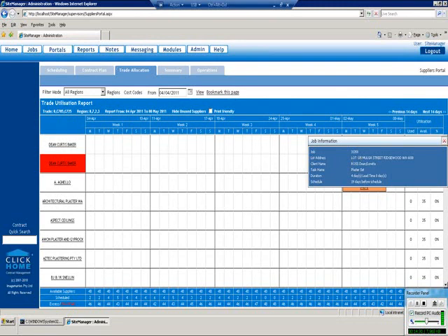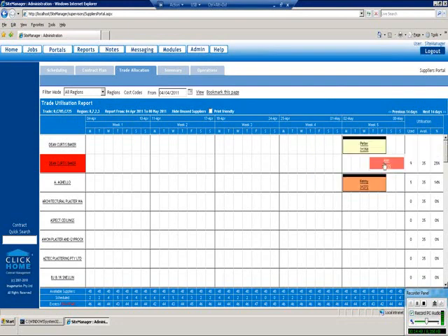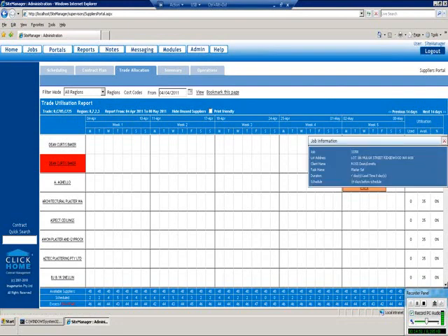That gives a bit more detail about that job. So job number, full lot address, the client name, the task name, the duration, how many days, and that task's relationship to the baseline. So is it ahead of schedule or behind schedule? So in this case, we're ahead of schedule. Okay, so you can just open that up by clicking on it, and it opens up, and red X to close it down. Okay.